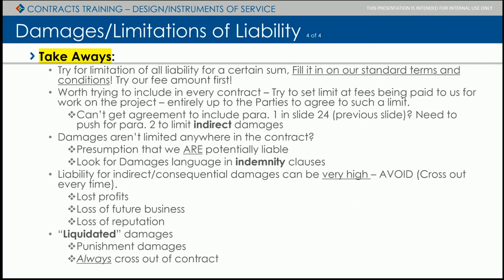And we've covered the rest. Always want to cross out liquidated damages. If that's the first go around, you always cross it out. Okay, so you might want to write that there. Liquidated damages, just cross it out. And if you get pushed, the answer is IMEG looks at those as punishment damages, and we're willing to waive